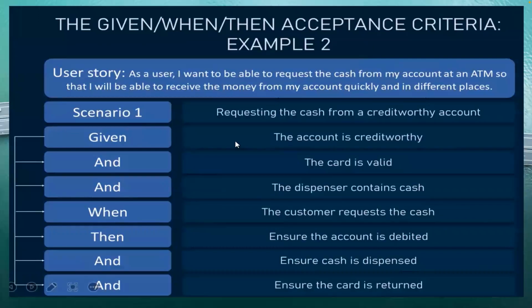Now, under this user story, I had about 5 acceptance criteria. Given that I am an admin with access, I can't share that. I'm sorry, it's on my work laptop. I'm just giving a practical, hands-on experience here, based on what I've done recently. Given that I am an admin with access, I have navigated to the employee profile. When I review the gender dropdown, then the options should have the below. So I wrote details of all the options: male, female, gender diverse, non-binary, choose not to disclose.